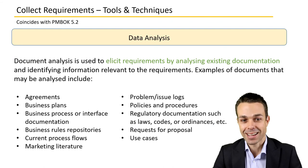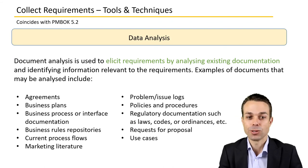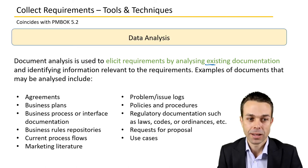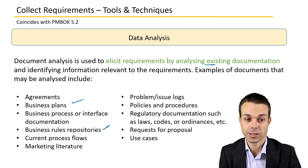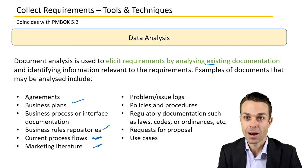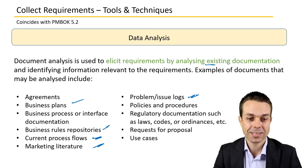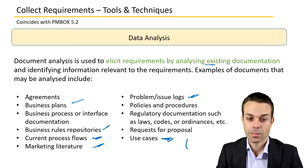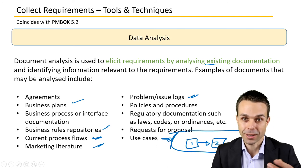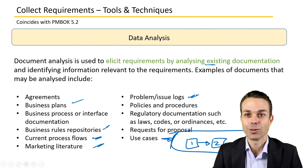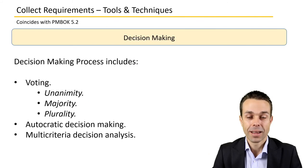We'll need to analyze that data as well. Document analysis is used to elicit requirements by analyzing existing documentation and identifying information relevant to the requirements. Documents that might be analyzed include business plans, business rules, processes, current process flows, marketing literature, existing problem or issue logs, and use cases — how something is being used, what steps are involved, and what problems the end customer is running into. That's all part of your data analysis for collecting requirements.